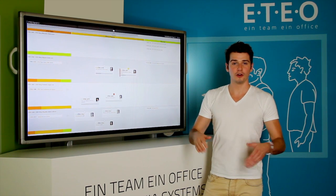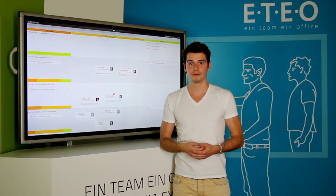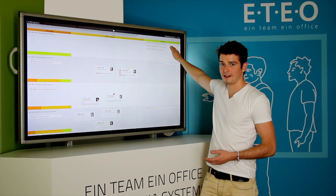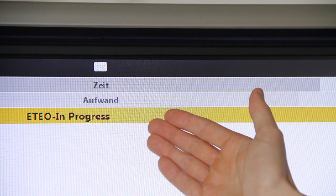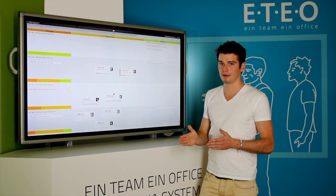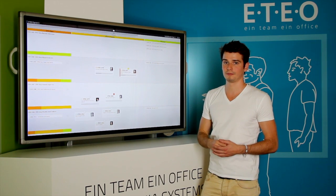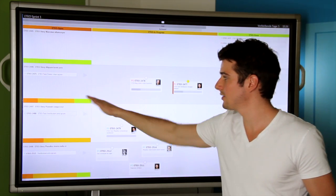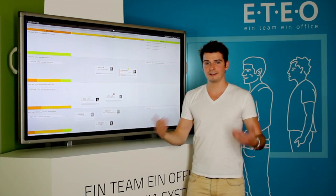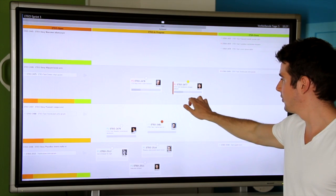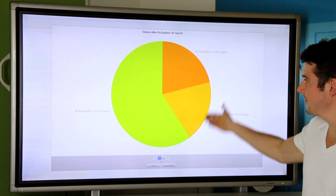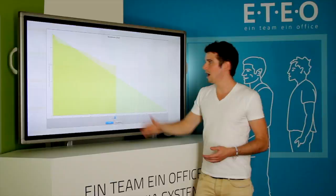The Eteo Board offers different possibilities to visualize the progress during a sprint. There are two bars at the top of the board: the first one shows the remaining sprint time, and the second shows the remaining effort. Should the two differ too much, the scrum master should check the performance of the team. Within the stories, I have indicators showing the progress. Should I require statistics covering the complete sprint, I open the statistics view using the context menu. Here I can view the complete sprint progress and can open a burndown chart.